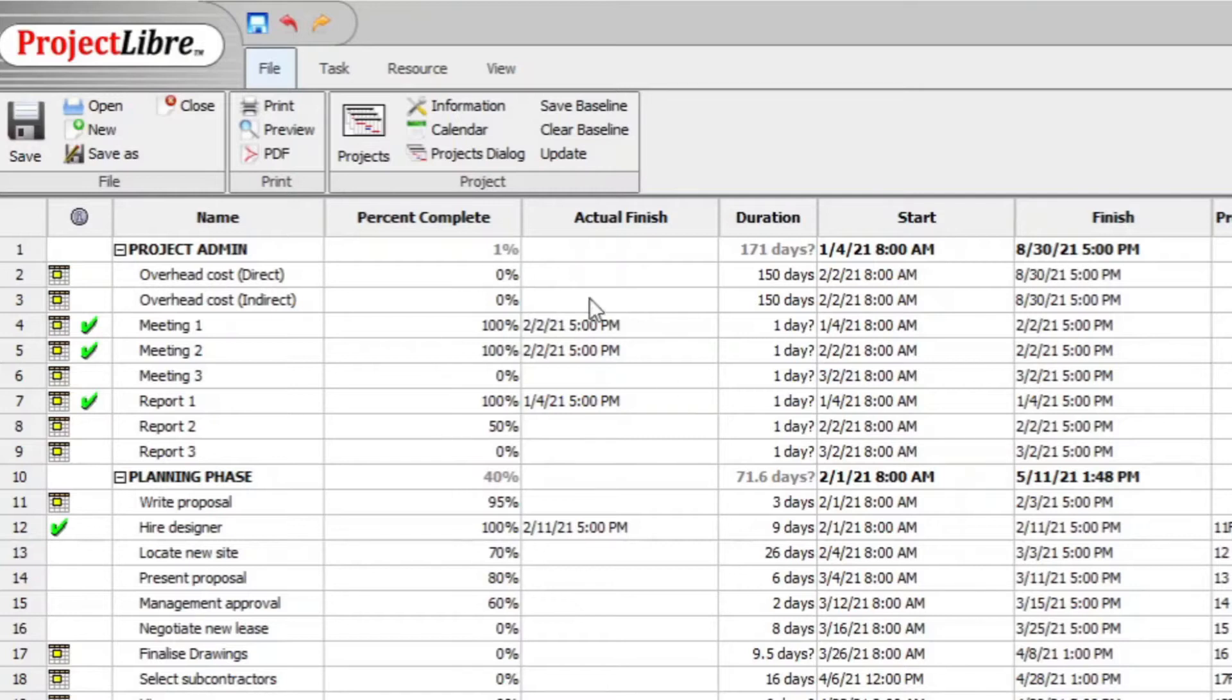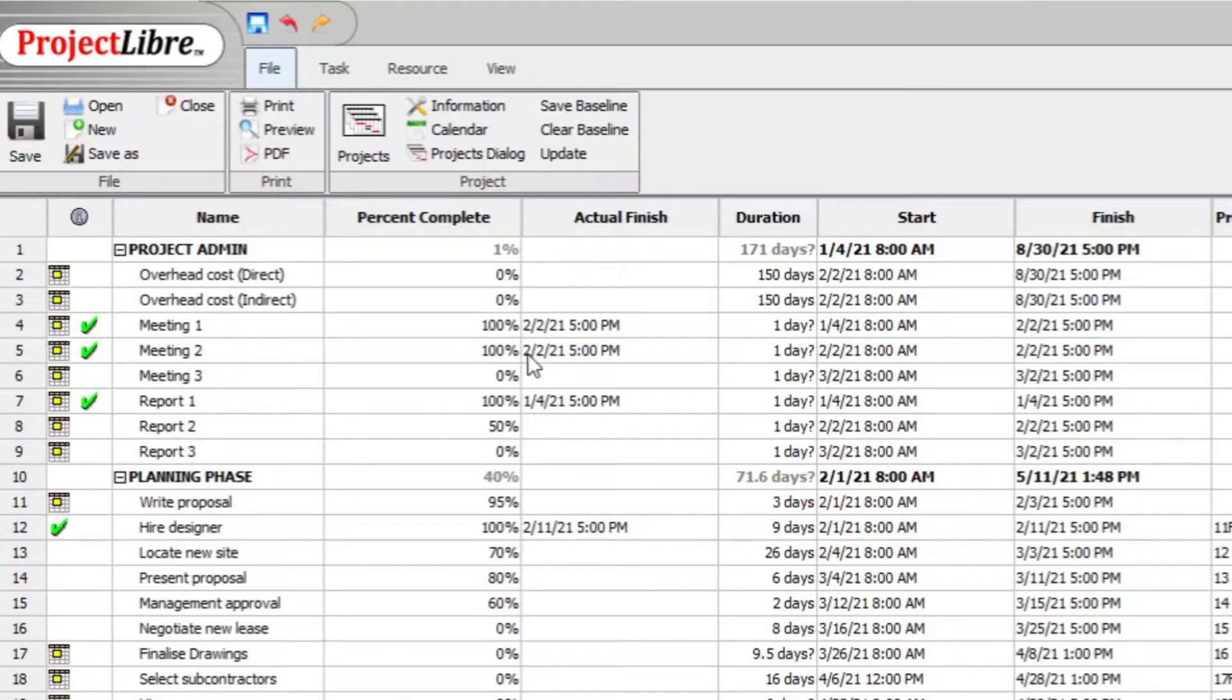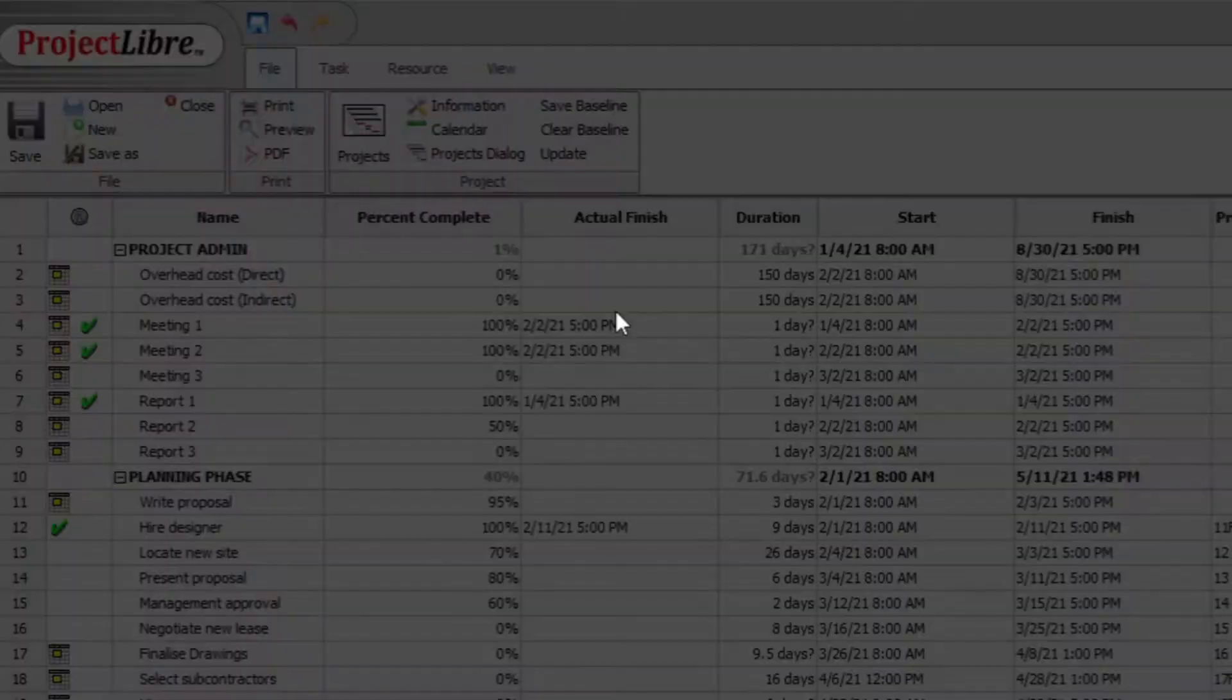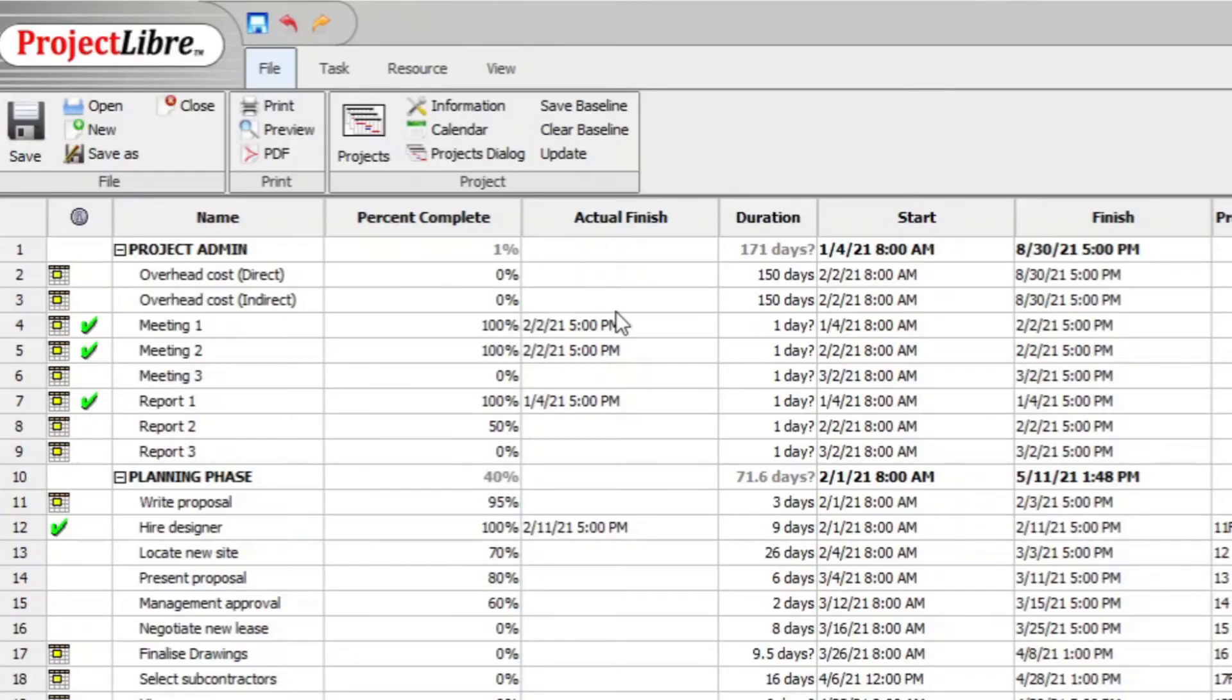You then can make a screenshot of this data because you will need it to again insert the data after you have established the baseline. And print screen. And now you reset everything to zero.